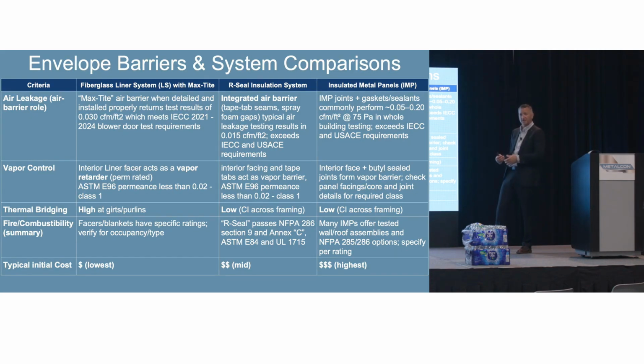They all think they're going to go to college and be the boss. So there just aren't as many people that want to do those jobs. So what we're finding in the industry is we're trading lower hours for higher material costs because we can substitute that and still get the projects done with less manpower. So that's one other thing to look at.